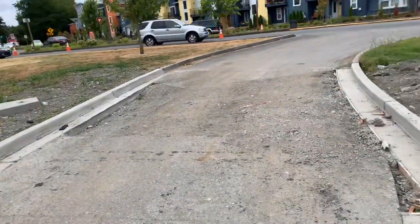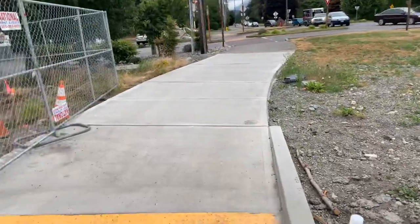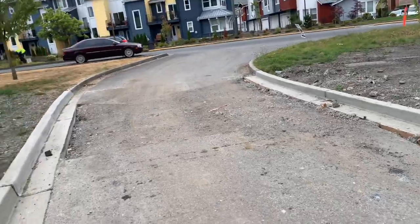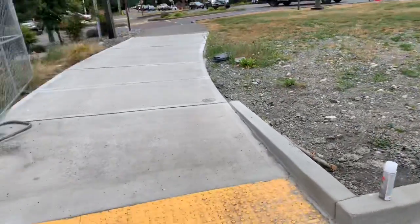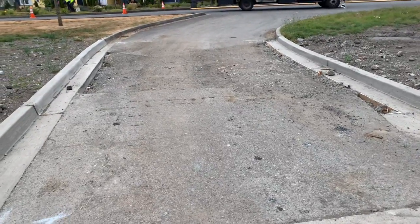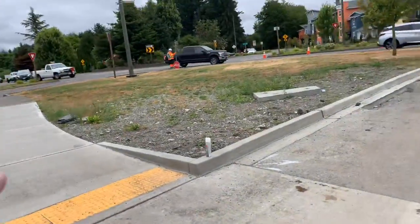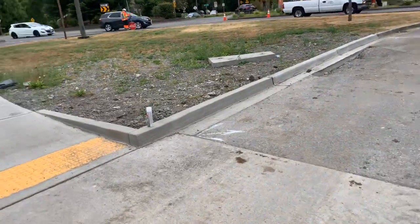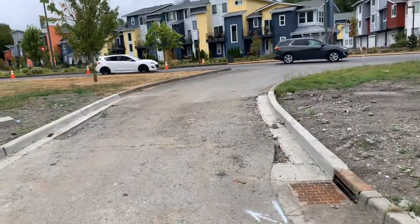There was a question about whether or not we need traffic control or a flagger on this. And I think the reason for that is because of the sidewalk. I know Minot was saying, oh, we don't need a flagger or anything, but this is city sidewalk right here, and I don't think we can just block that off. So when we bring our asphalt crew out here, we need to at least have somebody on the crew that can patrol the sidewalk when we do this work. Once our truck's parked here, they're obviously not going to be able to get through here, but we definitely don't need any flagging out here on the road.